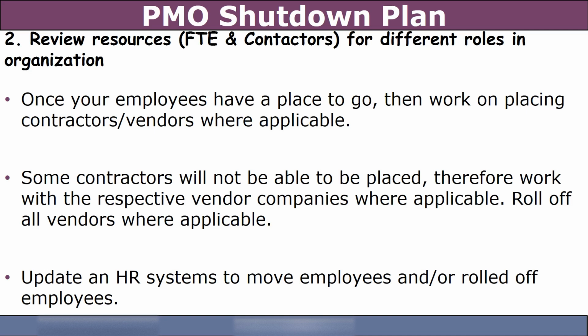Once you roll the employees off and or the contractors or whatever you do with them, you have to go back and update your HR systems. You'd be surprised how many people roll off or let go of an employee or a contractor and they never come back around and update the HR systems. So it's a critical component that you're going to want to do, regardless of where the individuals have landed in their new roles. Just make sure you've stepped back and gone back to HR and have updated the systems appropriately.